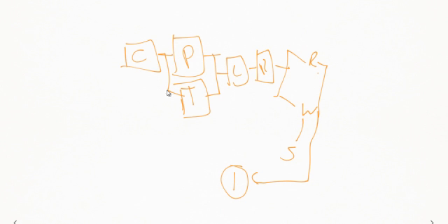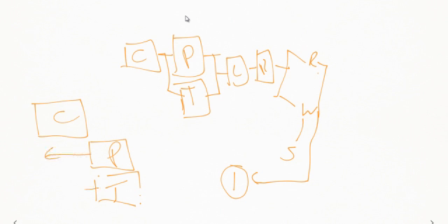Previously, we had this logic that we have clean. Once clean's finished, then the patching can occur and the taping. That was our original configuration. What we've done is bring these activities here and said, you don't need to wait for this activity to finish before you can start these. As soon as this one starts, we wait a minute, which we called our lag, then these can start. And so our time saving has been because we've managed to bring these forward, regardless of the extra time we've added on.